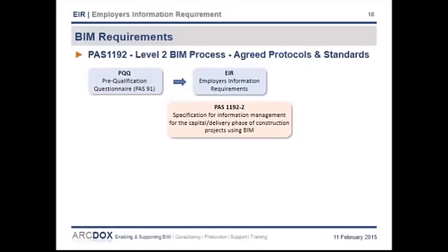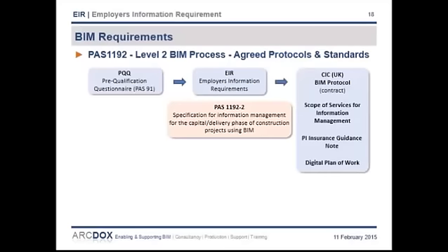So even before a client engages with design teams, they need to know that they're going to use BIM, because they'll have to include some BIM capability questions in their pre-qualification questionnaires. And then, of course, the client's commercial or legal team will have to make sure that their appointments and contracts documents refer to the BIM protocol, which is an addendum that will enable the use of BIM and set out the roles and responsibilities of each party in relation to BIM. And also part of the appointments will include this role of project information manager for both design stage and construction stage, which in turn means that the client will need someone on their side who understands enough about BIM to be able to liaise with the project information manager.